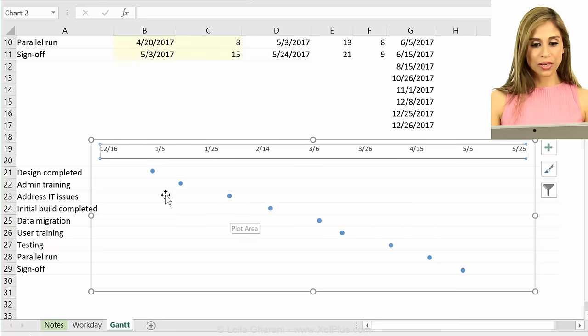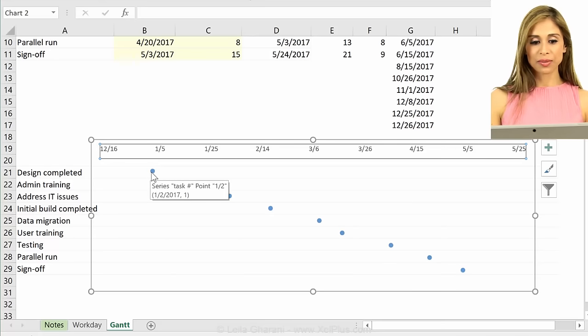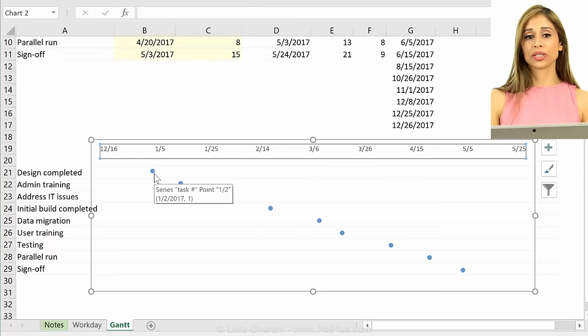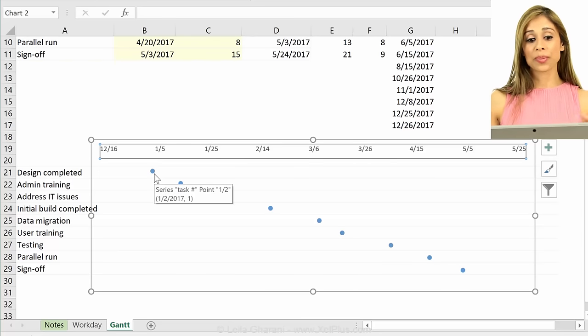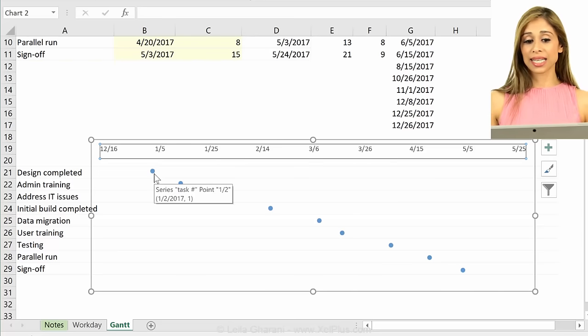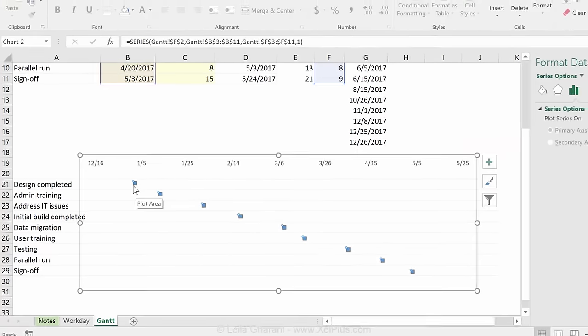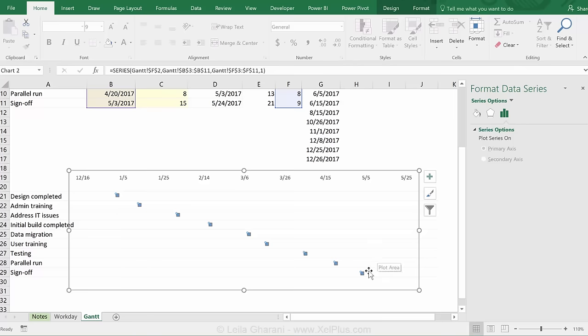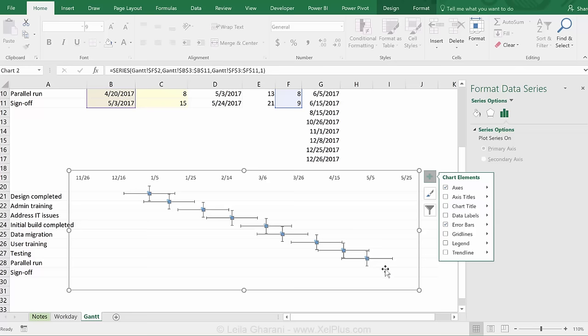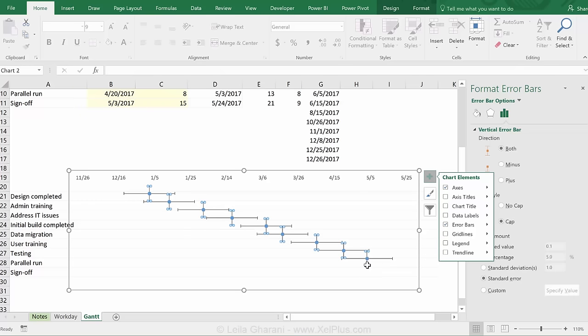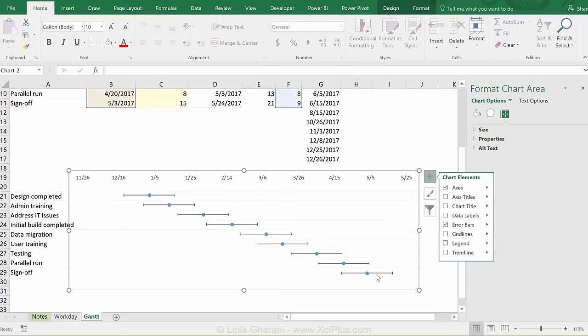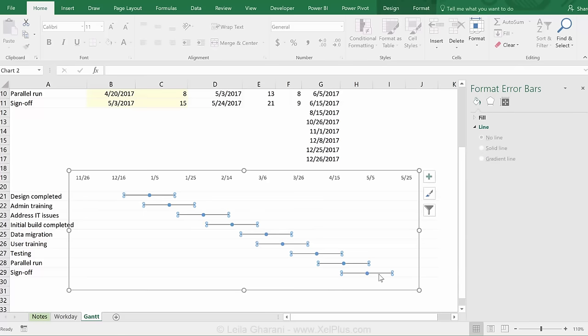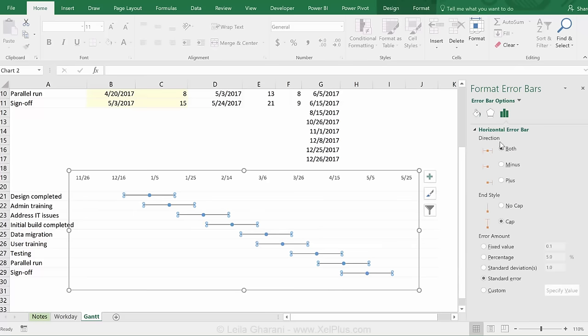So now based on this, I have the position of the task for the start date, but I need to find out how many days it should go. So that's exactly where the error line technique is going to be super useful. So I'm going to select the series. And for this series, we're going to add the error bars to this. Now, I don't need the vertical ones. I can quickly go there and press delete. I only want the horizontal ones. When I click on it, we can see the options that I have for the horizontal error bars.